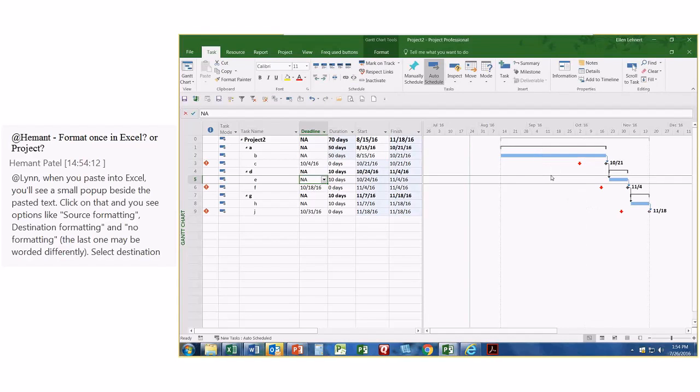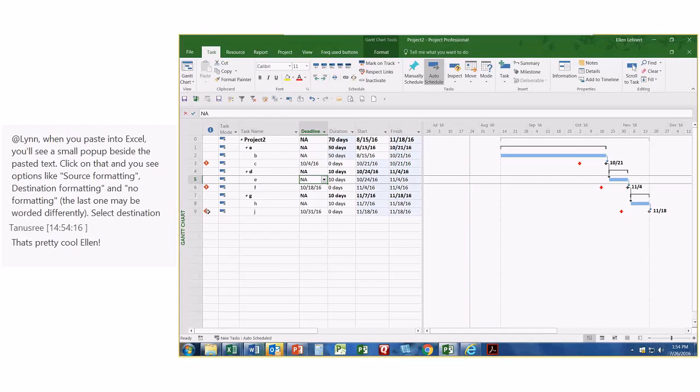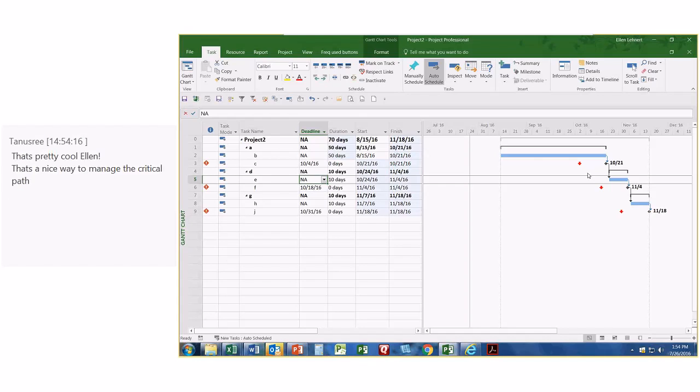There you go. Do you see how I get warning messages? Now, milestones are not part of the scheduling engine. They're deadlines. They are markers on the project, the Gantt chart itself. But they're not like constraints that are going to move out to a certain point in time and stop. So this will allow the schedule to keep going, but it warns you when you blow your deadlines.